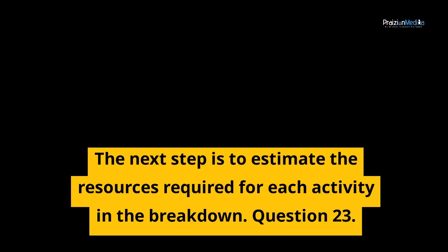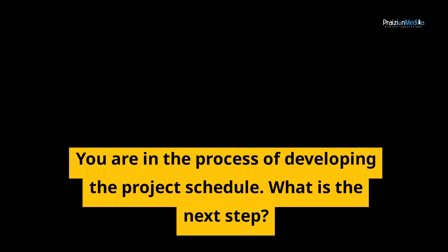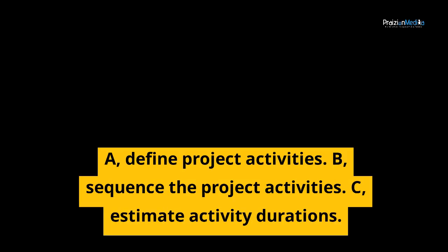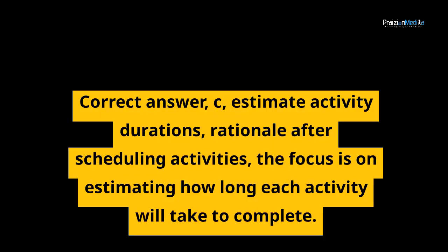Question 23. You are in the process of developing the project schedule. What is the next step? A. Define project activities. B. Sequence the project activities. C. Estimate activity durations. Correct answer, C. Estimate activity durations. Rationale. After scheduling activities, the focus is on estimating how long each activity will take to complete.